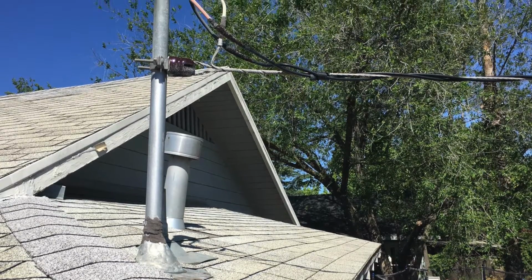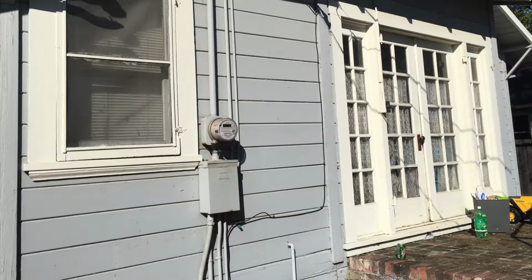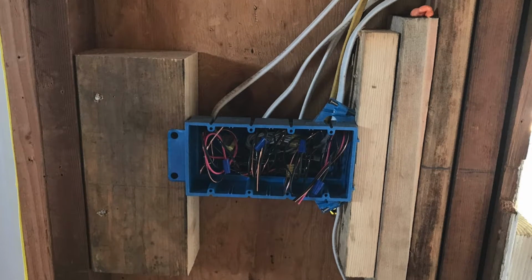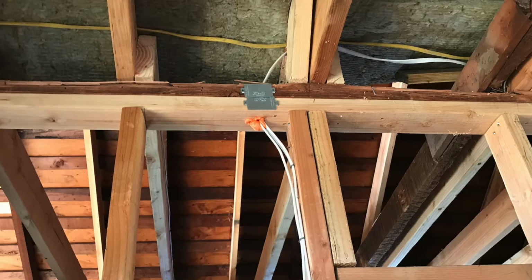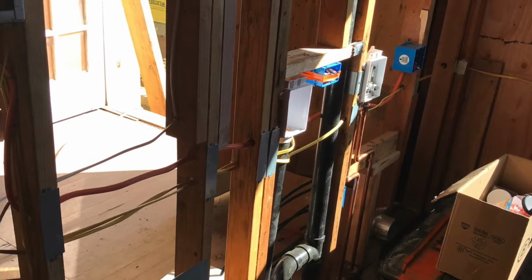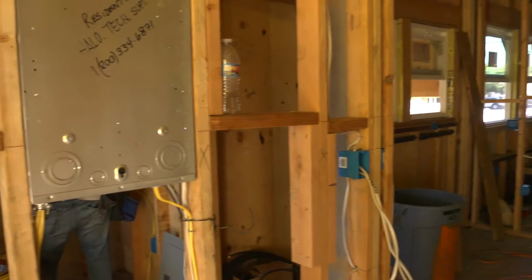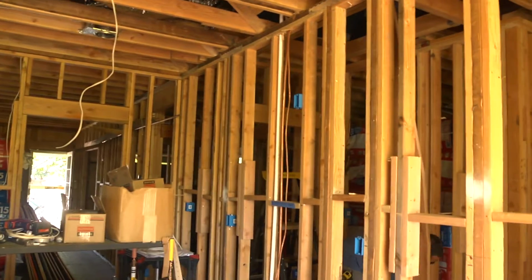The electrical needs of today's homes differ a bit from what they were back in 1906. You bet. Our reliance on appliances and electronics means that we're gonna need more outlets and all new wiring. All that was put into the original plans drawn up for this renovation. But between the time the contract was signed and the permits were issued, the building codes for electrical had changed. Yikes! That means more work than expected, greater expense than planned for, and it certainly puts a crimp into our project schedule. You know, changes will come up in every project. You just gotta be flexible and ready to adjust when necessary.